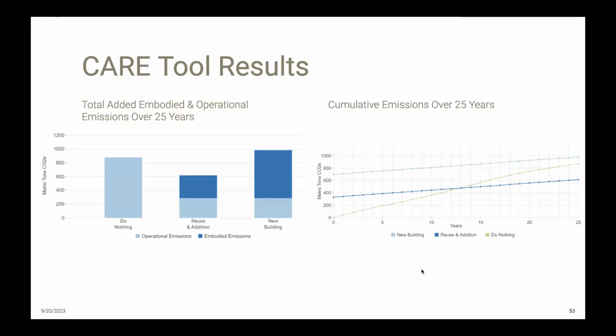When we aren't even thinking about anything like cost, for instance, but we couldn't resist thinking about that. And our back of the envelope calculation is that a new building would have cost probably at least twice as much as the renovation, which would have been a non-starter for the Boys and Girls Club, as it would be for many of our other small nonprofit clients.